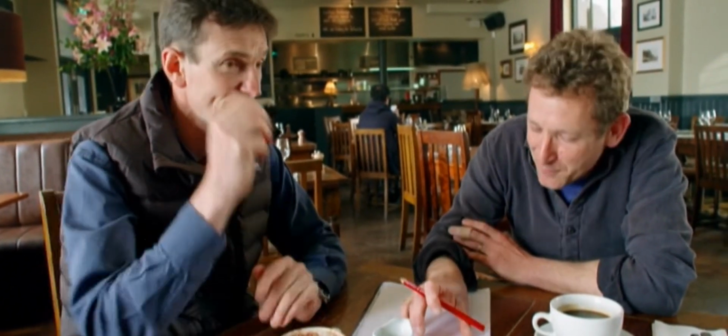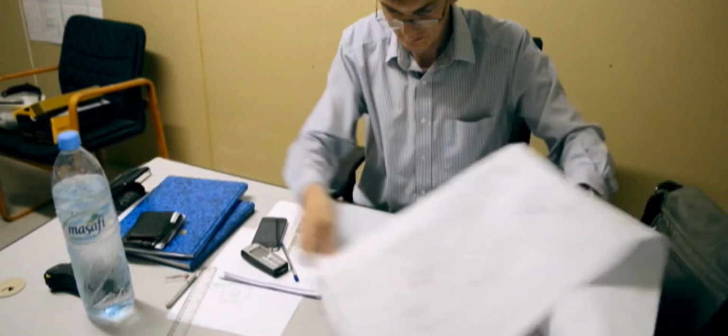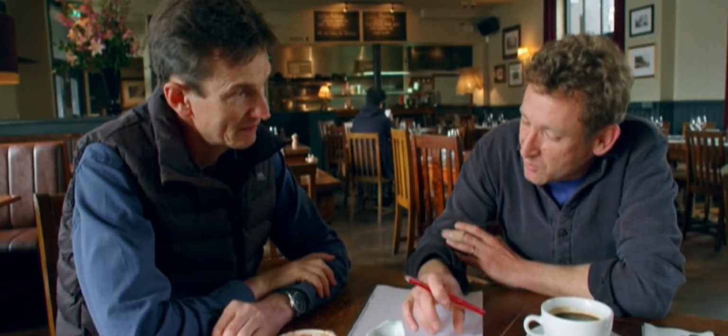If you think of a standard construction project in the UK, it would take you 12 months of build, let alone the design. So I think we've got to be designing and procuring at the same time. We don't have the luxury of a design period as such. So that's going to be quite interesting. So I think we need to work that out with the various teams.